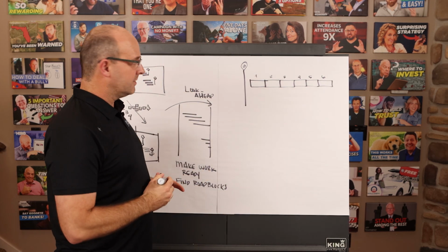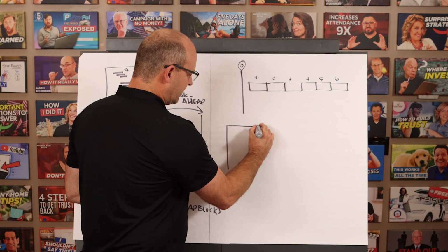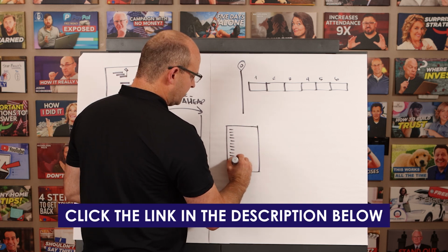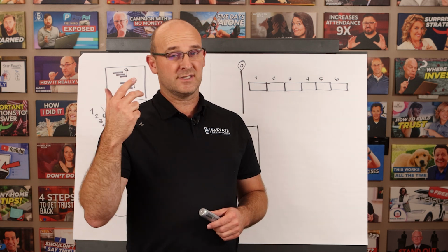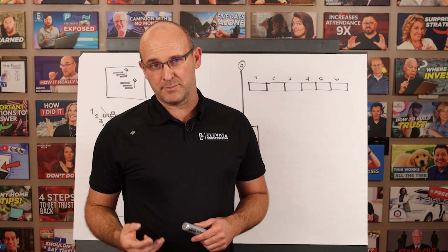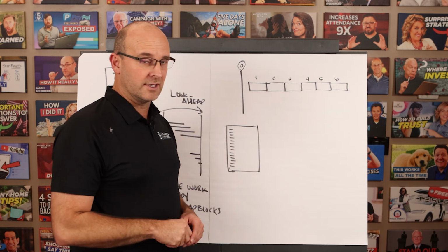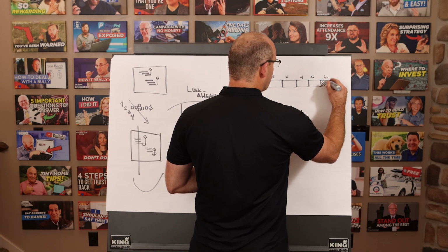The concept here is this. According to that 17-point checklist that we're going to link you to in the description below of what it takes to make work ready, like conditions of satisfaction, primary planning, secondary planning, spatial planning, all of the items, you know what list I'm talking about, we want to spend our time and focus on week 6.